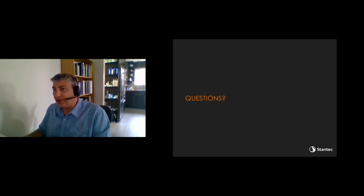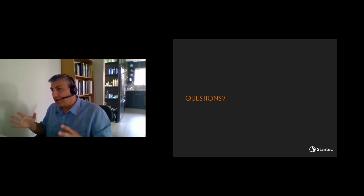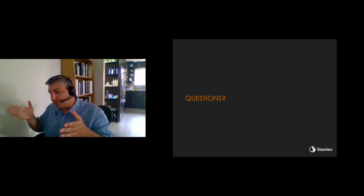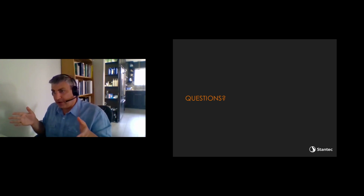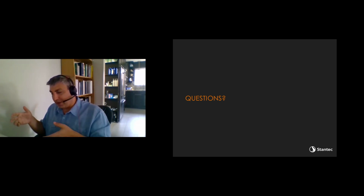Sure. Okay. Questions popping up. Can the initial geotechnical report be considered the baseline? Baseline reports, at least in our area, they mean something. It's a little bit different from a design report or a standard geotechnical report. In the baseline report, there is effort that specifies the range of certain parameters that can be expected. So for example, how transmissive the soil is, the hydraulic conductivity, will specify a lower limit, an upper limit, and what can be expected. The same thing can be provided for the types of soils that are to be encountered.